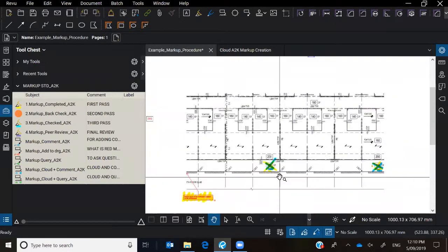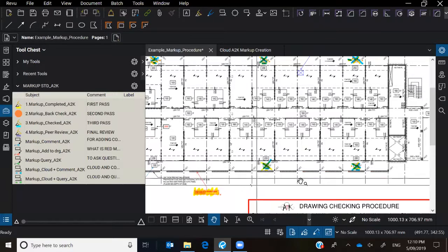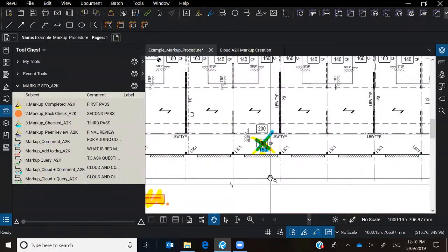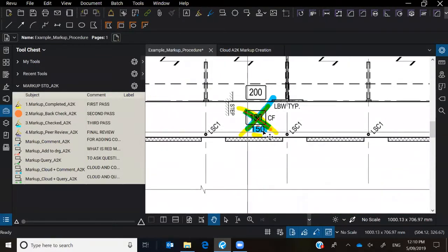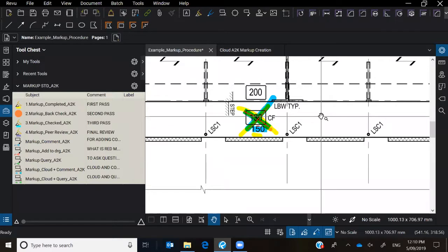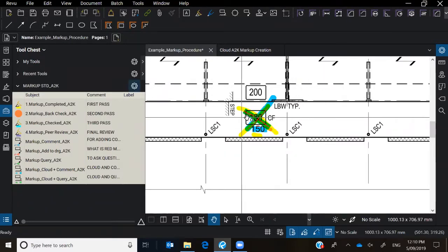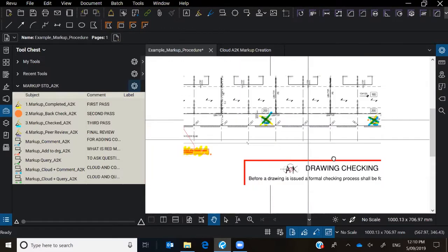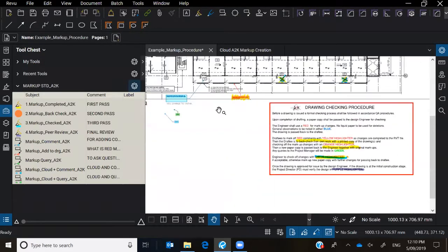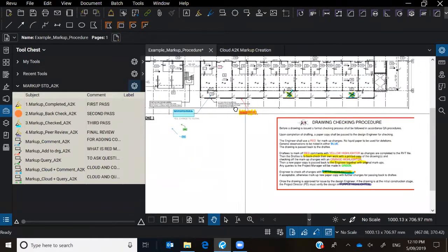Now you can see that in my previous markups here for this particular drawing, the actual engineer has gone through, crossed off, and given us a little bit of a markup to say how there's now not 130 anymore, it's actually 150 thick. As a part of that process, the draftsman has come in, marked it off in a yellow highlighter first to establish that it has been changed, and then also put a little orange dot beside it to say it has been back drafted as well. The blue comments, as I said, are a communication process in between.